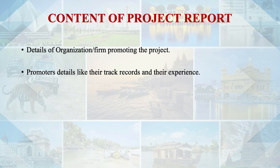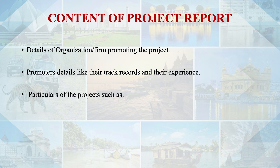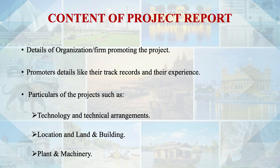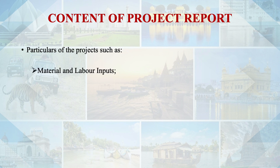The report should also include promoters' details — their track record, qualifications, funds they are contributing, and technical skills they bring. Particulars about the project include technology arrangements, location, land and building, plant and machinery, equipment, material inputs, labor requirements (skilled and unskilled), managerial staff, technical skills, utilities like power and water supply, and a detailed schedule of implementation bifurcated into steps and activities.